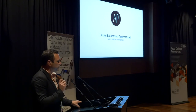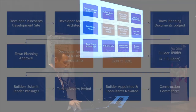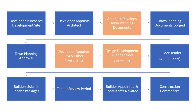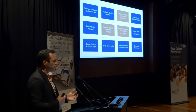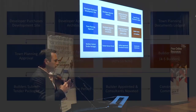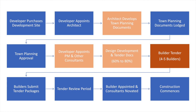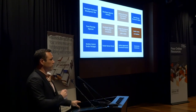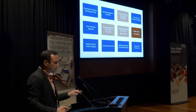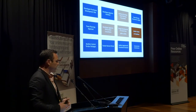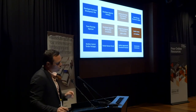So if we look at the D&C process and ask where a builder can actually get involved, there are mainly three areas before the builder tender where we can get involved as a consultant. Pay a builder a fee like all the other consultants and get them to give construction advice. The fundamental flaw with this proposal is that no builder is going to do that knowing it will go out to tender and all their IP and smarts will go to everyone else. So if you are getting a builder involved during what I call a token ECI that's going to go to tender, they're not going to give you everything anyway. They'll keep a lot in their back pocket trying to gain advantage, so when the tender comes they already know the design and try to beat everyone. You're not really going to get that efficiency.